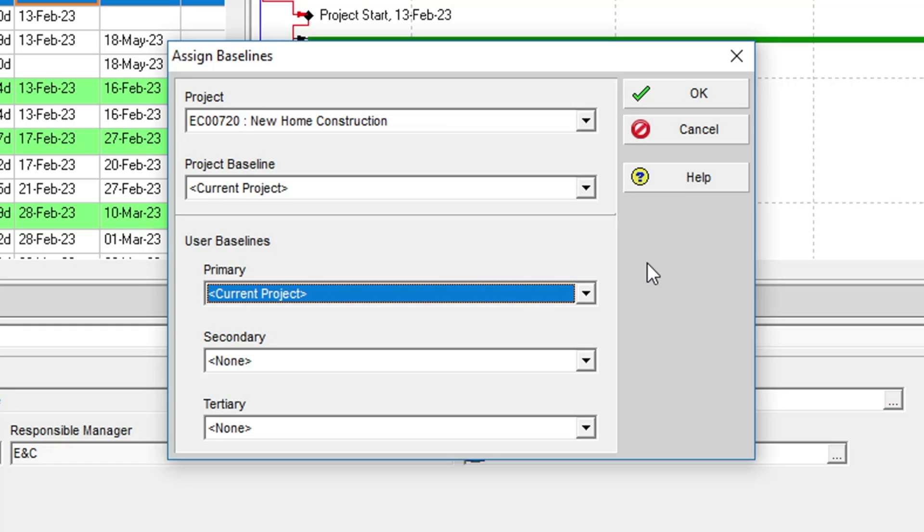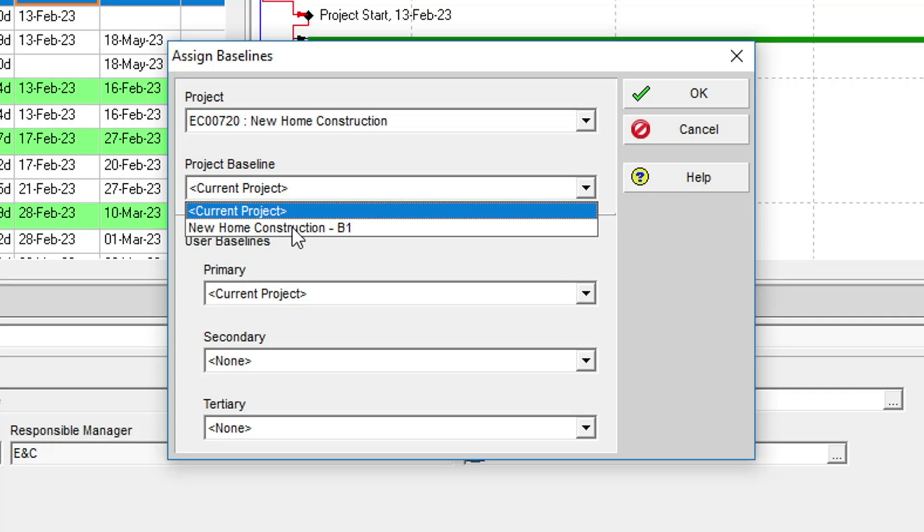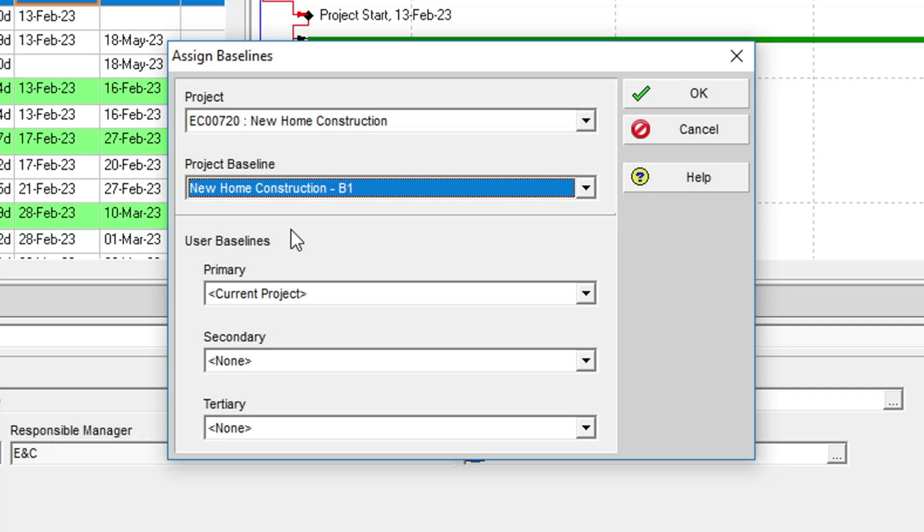What we need to do here is set the Project Baseline to the baseline we just took. This takes care of the Project Baseline assignment and now ensures that if the current plan begins to change, the Project Baseline fields in P6 will reflect the original baseline values.